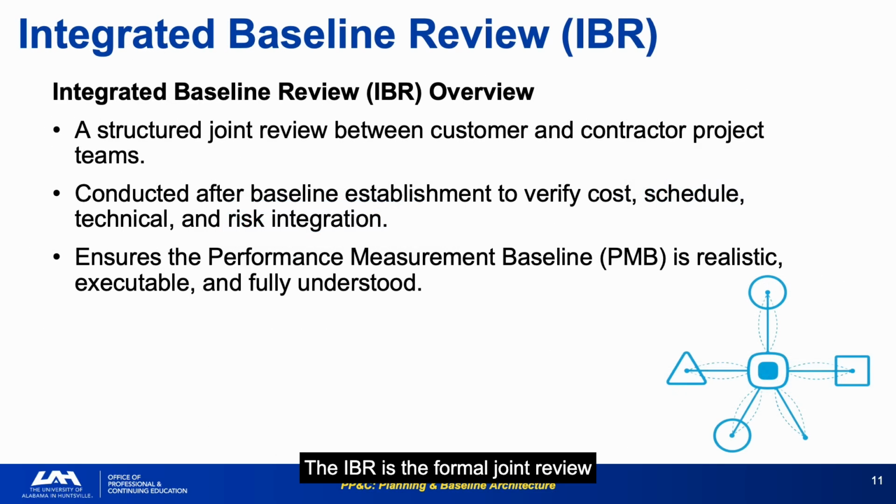The IBR is the formal joint review between NASA and the contractor that verifies whether the performance measurement baseline is realistic, properly integrated across scope, schedule, cost, and risk, and fully understood by the people who will execute it. The IBR validates that the baseline is executable, that the control account managers understand their plan, the resources are allocated to the right activities, and the schedule logic reflects reality. Ensures the PMB is realistic, executable, and fully understood.